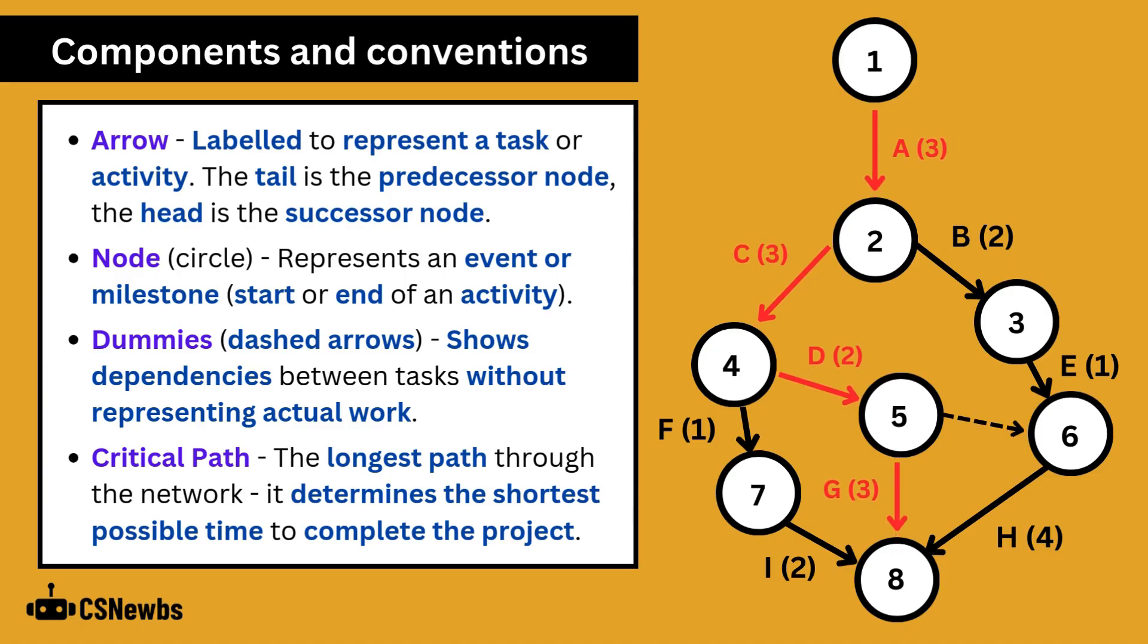The final component is the critical path. This is the longest path through the network and it determines the shortest possible time to complete the project. Again we'll look at these later and there is a separate project planning tool to analyze these. Be aware that very simple arrow diagrams may not actually show the critical path.